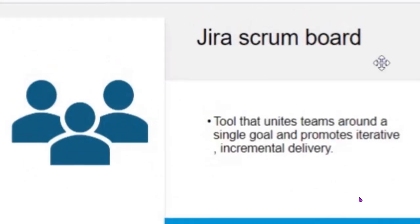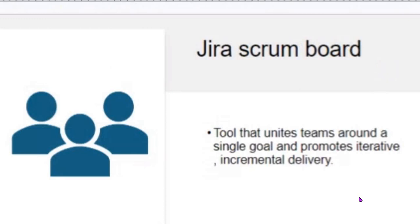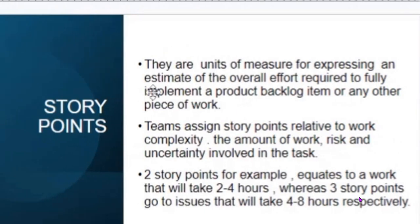We have the Jira Scrum Board, which is a tool that unites the team around a single goal and promotes iterative, incremental delivery. We also have story points. Story points are units of measure expressing an estimate of the overall effort required to fully implement a product backlog item or any other piece of work. Teams assign story points relative to work complexity, the amount of work, risk, and uncertainty involved. For example, two story points equates to work that will take two to four hours to complete, whereas three story points go to issues that will take four to eight hours.